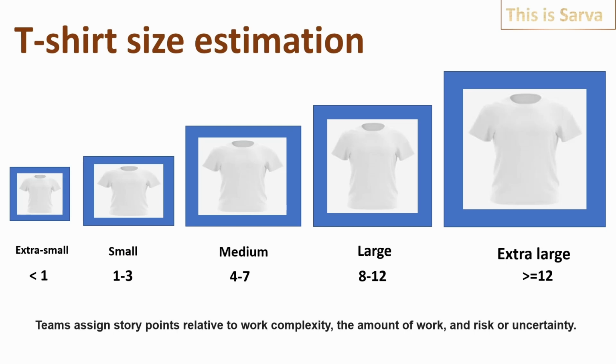Story points are used to forecast the effort to complete a task. It is a relative estimation. For example, if one story is considered small and completed in X number of days, when you estimate the next story, what is to be done is to compare it with the already estimated story and estimate it as twice as big as the previously estimated story.